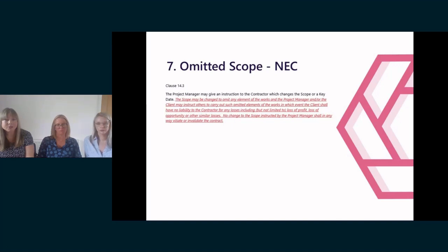Now, I say this clause potentially gives the employer this right, as it doesn't seem the courts are too keen on these sorts of clauses, and it is at least arguable whether they would be enforced or not. So 2 cases from the early 2000s looked at this point. The first is Abbey Developments and PP Brickwork. Here, the court held that the contractor had a duty to carry out the work it contracted to do and a corresponding right to be able to do so.